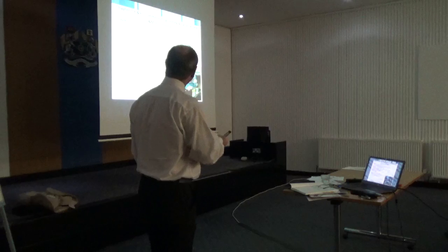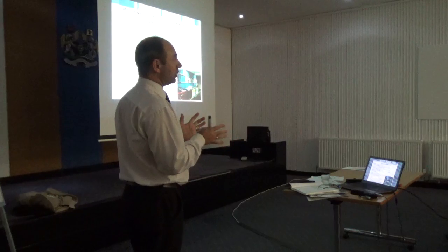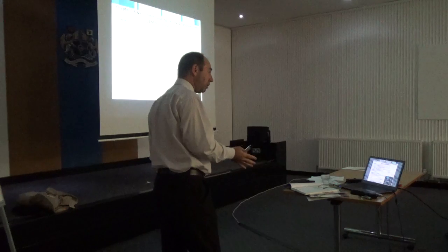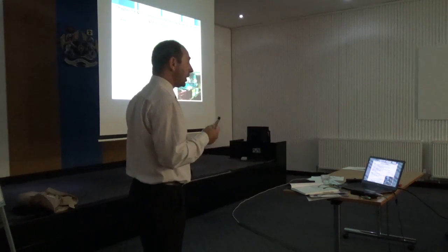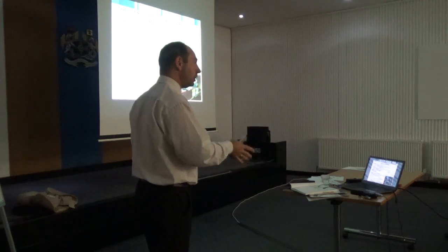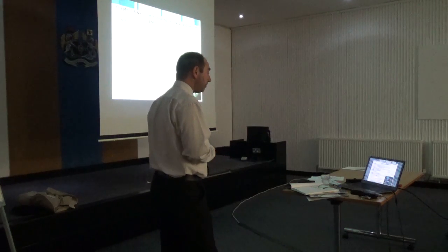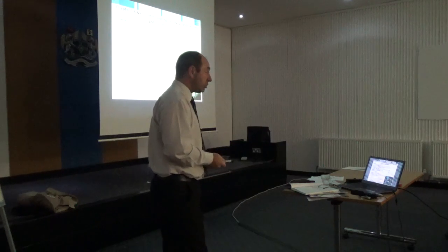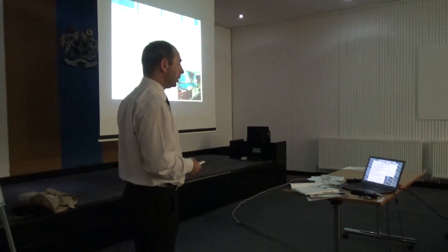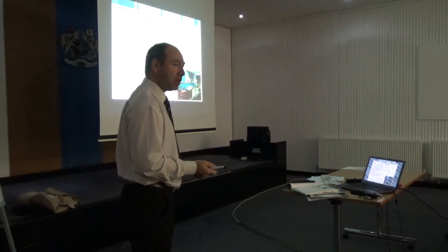So carrying on, handover procedures. It talks about the process around it if you have sectional completion or beneficial use, partial handover. It gives you some templates, but again, for you to augment and tailor to suit your particular building and environment. Then there's inspections, snagging and defect management. The importance of user and operator training. What equipment do I need? What specialist support do I need? What does the handover information look like, and how does that procedure work?